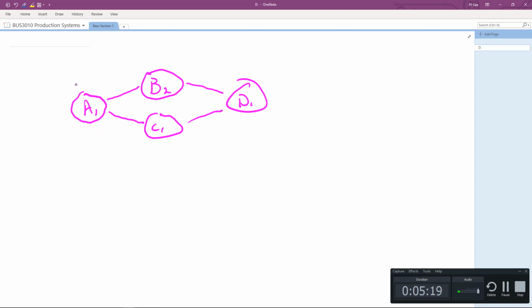And we're going to introduce a nomenclature here where we'll take A and go through the network as the early start, early finish network to begin with. We're going to put these numbers on the top of each of the bubbles, and that's going to be analyzing from front to back, from start to finish, what the longest path through the network is. So at the outset, we're trying to figure out whether it takes longer ABD than it takes ACD. That's critical path. Critical path equals the longest.